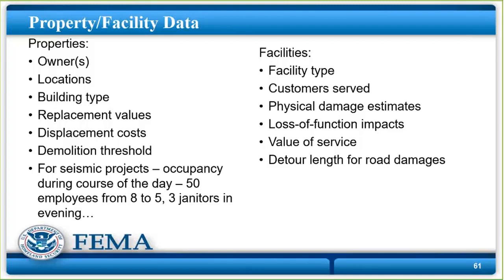And why replacement cost value is important: that's what goes into the benefit cost analysis, not the actual current fair market value of the house, which is depreciated. And as a result of that, you get more benefits associated with that.